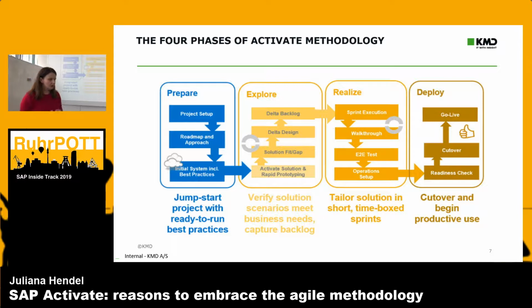The prepare phase is where you create your project. The project manager will make a project management plan. Project governance will be established, policies, practices, all that will be in place, and you will have your sandbox environment delivered and best practices downloaded into it. This baseline build is what you will be showcasing to your customer in the next phase, the explore phase.